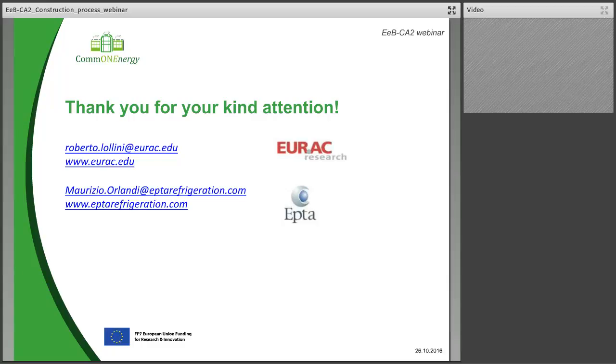But what they usually do is to have a multi-annual plan for retrofitting, also considering a shopping center as a sort of continuous retrofitting process. So if we consider this investment not as a single and unique investment, but as part of the retrofitting plan, implemented and executed in different years, let's say 5 years or something like that, this could also be feasible from the economic point of view, considering not only the energy saving and the payback time, but also the improvement of the indoor environmental quality.